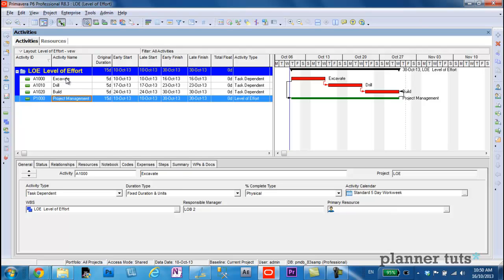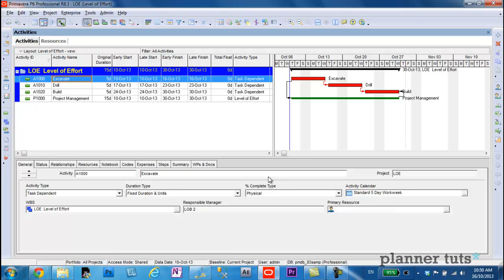Up here at the top, the excavate activity is using a more common way to status in construction, engineering, oil, and gas, using physical percent complete.